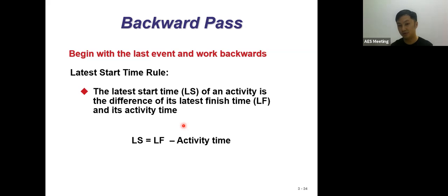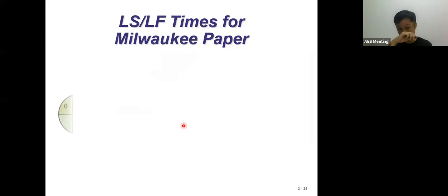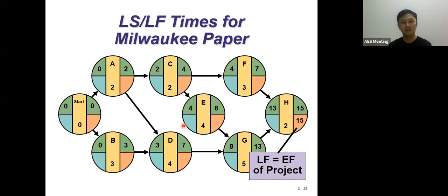So when this formula is given to you, what is the next thing? We're looking for the late start and late finish of the activities. If I have 15 as the duration for my late finish, this is also the same as the earlier finish. So these two by right are 15 and 15. This only applies for the last activity, so it cannot be applied for F, G, or any of the activities before H, because H is the last activity.